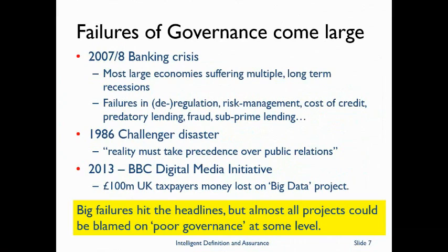Very recently in the UK, the BBC proudly announced some years ago the Digital Media Initiative. It was recognised to be in trouble a couple of years ago and supposedly put back on track. But in the last month, the announcement was made that it's been cancelled. And I think £98 million of British taxpayers' money has been lost on a modern big data project.